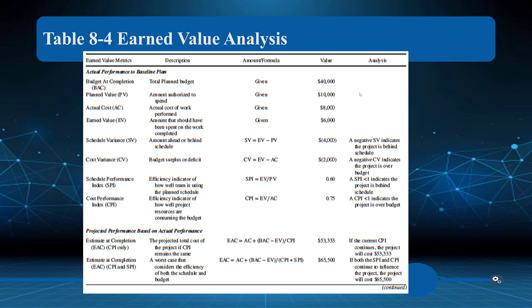Even though these numbers look really poor, we would probably continue the project as long as the stakeholders accept the cost increase — and there will likely be a time increase as well. If they can accept that, the project continues. It means the total cost of ownership increases, and the time to recoup any revenue from the project will be longer, but the project may still be worth completing.